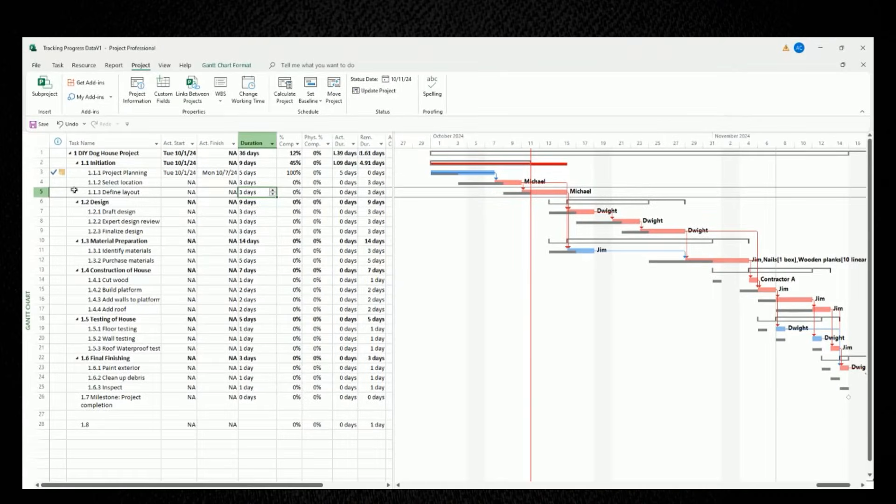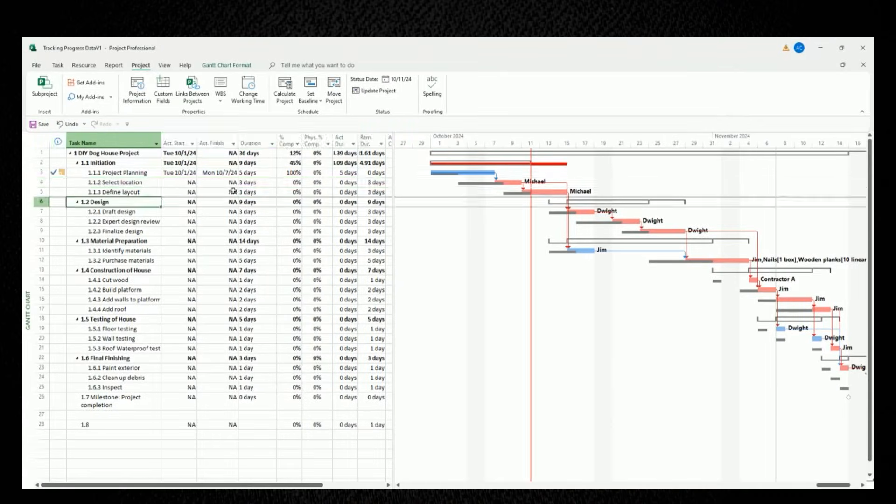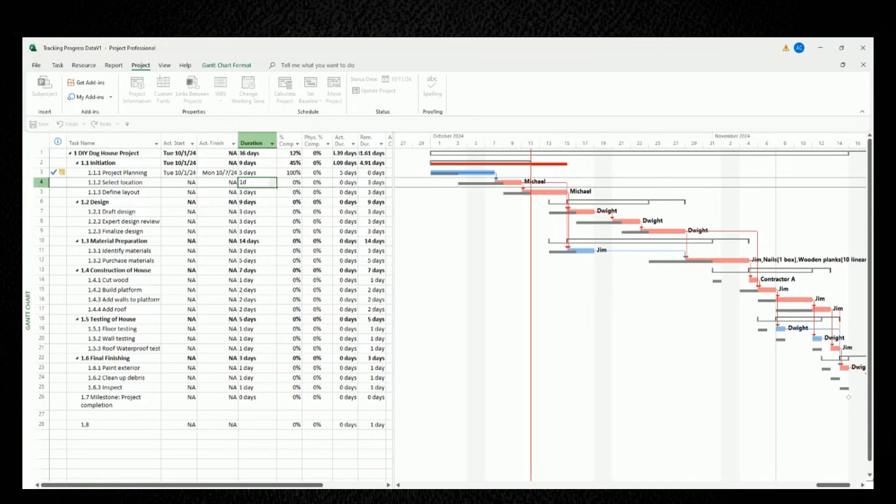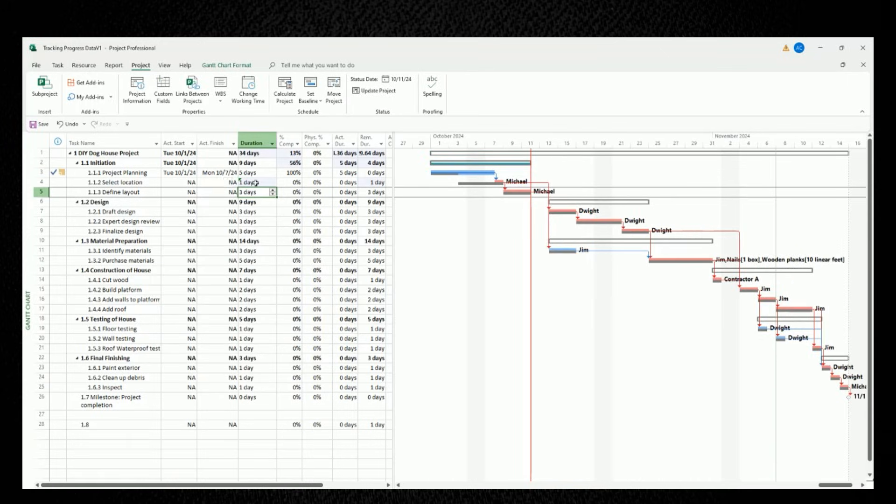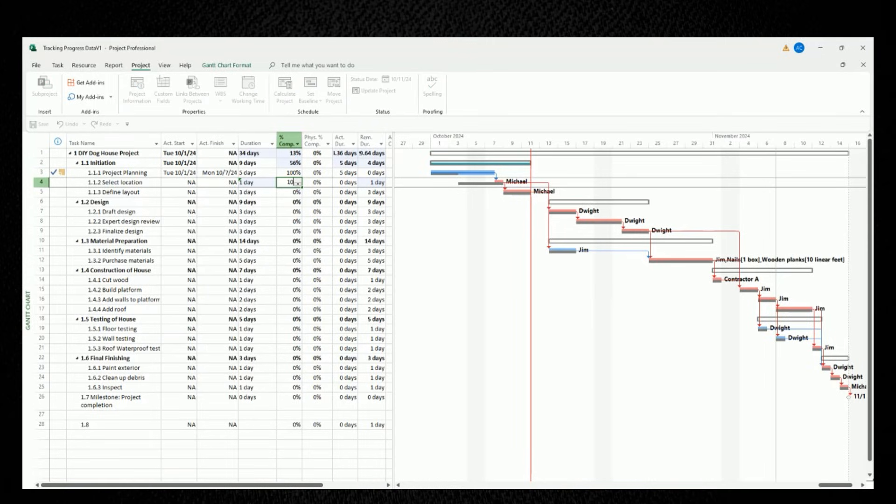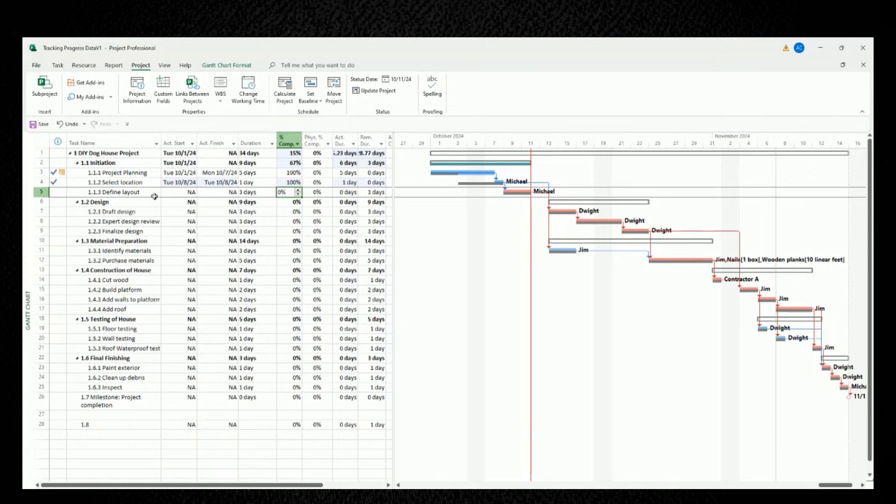Now let's say that our second task of select location was completed in one day, instead of our planned duration of three days. So we'll go ahead and we'll update our duration to be one day. And when we do that, we'll see in our Gantt chart that our baseline durations for all the tasks now match all the tasks that are downstream, which is really great news for us. Let's mark this task as also 100% complete in the percent complete column.